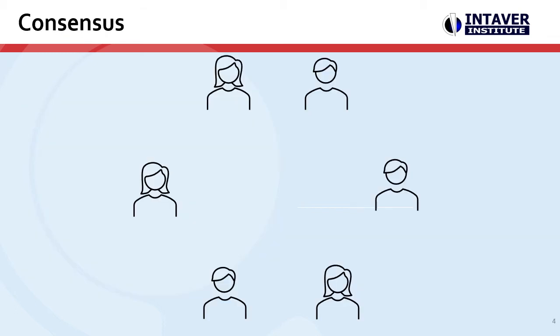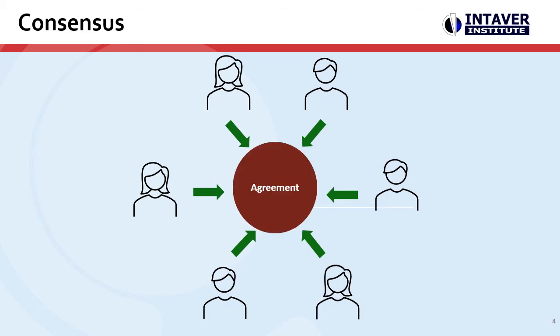The first method is called consensus. It is a face-to-face meeting to discuss issues, eventually come to an agreement. Pros of this method: it is easy to organize and it is transparent. Cons: can be dominated by individuals with seniority or other sources of influence with a "we discussed" and "I decided" outcome.